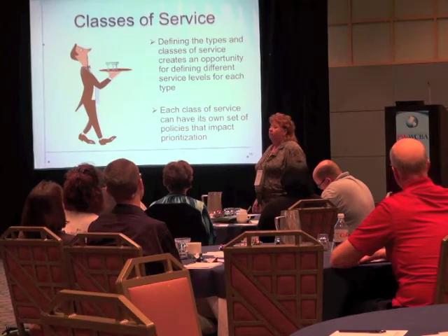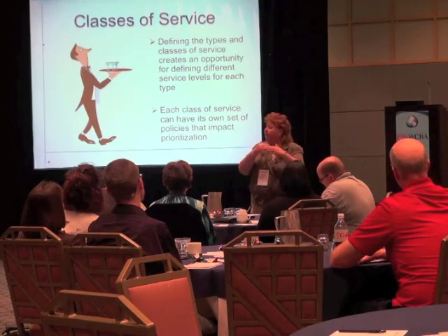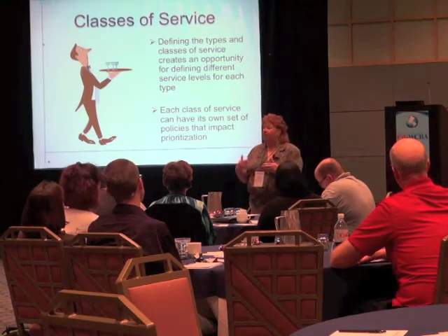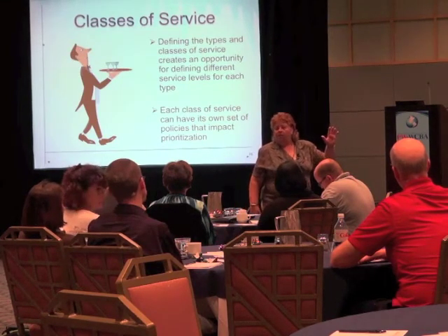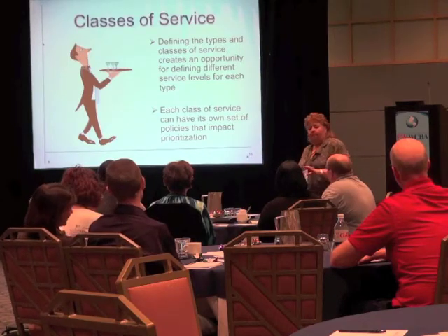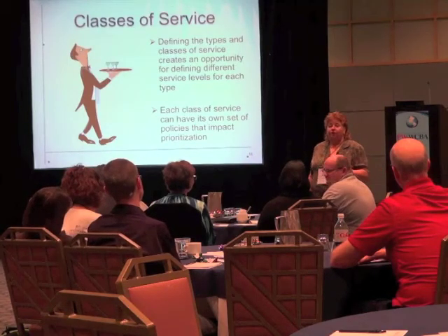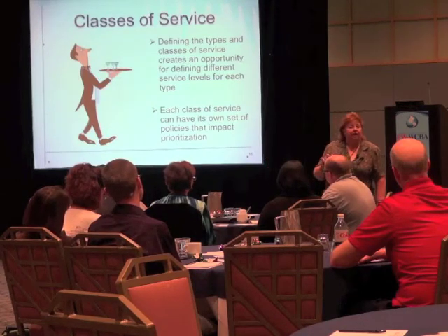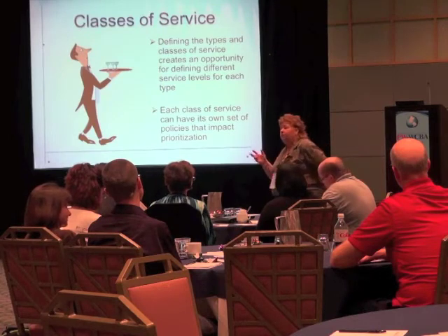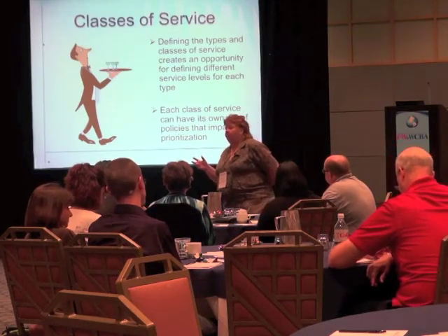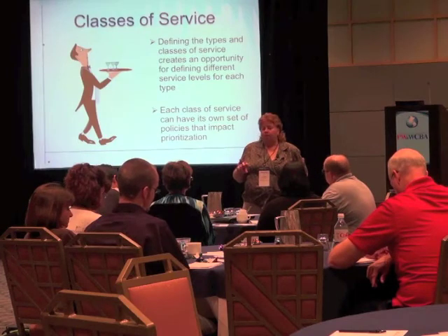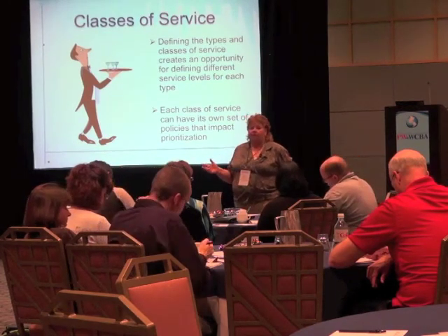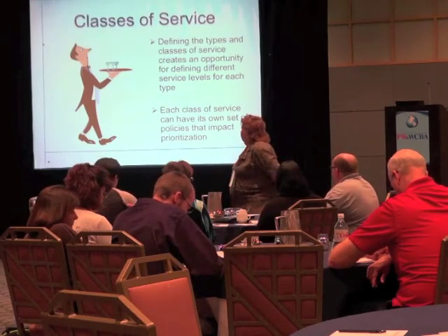A good way to start that conversation is: how can we define the classes of work we have? Yes, we have maintenance. We have new development, and then we also have hair on fire. Anybody have hair on fire stuff? I've literally called the hair on fire lane the fire lane. I've also used it for bugs and defects. It's another class of service possibly. Unfortunately, sometimes we learn about a defect because a hair on fire thing happens. You're like, oh my gosh, there's always a defect in there somewhere.